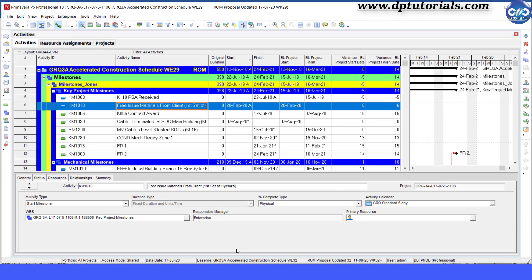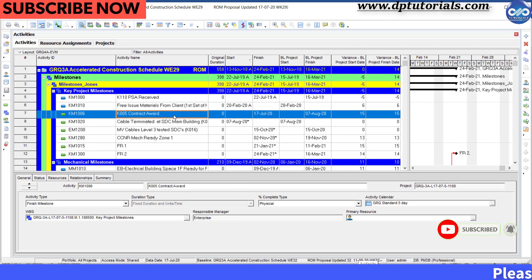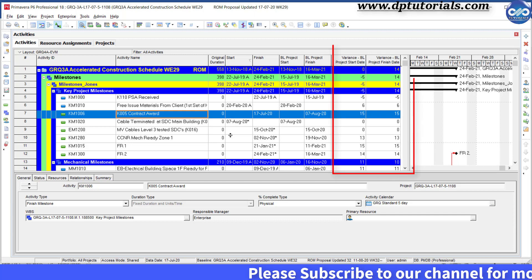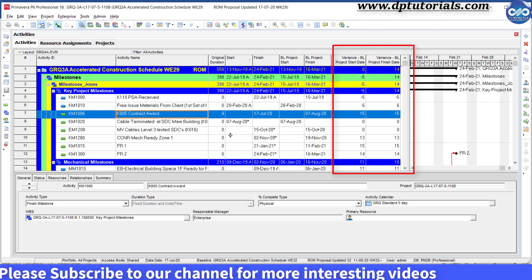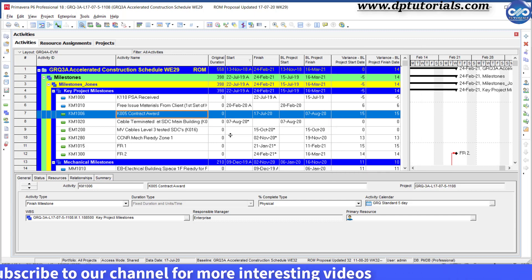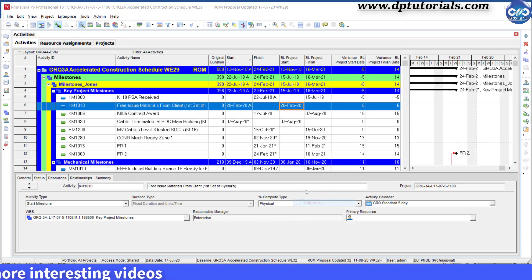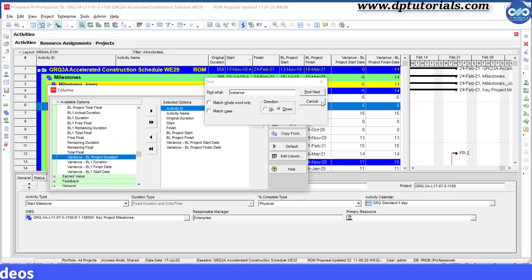Now, it is possible to report the activities which are delayed or ahead with respect to the baseline dates. Different kinds of variance reports can be created using the filters feature. Simple ones are like Variance Baseline Project Start Date and Variance Baseline Project Finish Date. You can also add them into your columns so as to view them quickly.